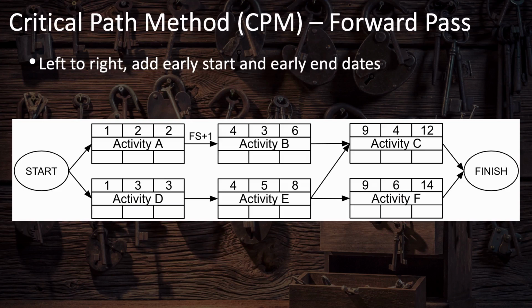It starts at the beginning of day 9, lasts for 6 days, and ends at the end of day 14. Activity C could start on day 7, except for the fact that it has to wait until after activity E as well. So the soonest it can start is the beginning of day 9. It lasts 4 days, and so it goes through the end of day 12 before it's finished. And that's the forward pass.